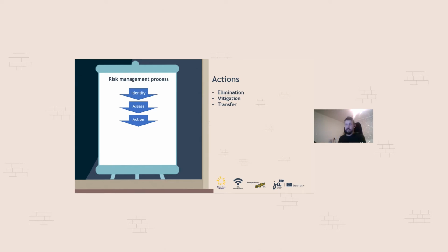So let's say the participants need to get to the youth exchange. And usually when it's not more than 5,000 kilometers or 2,000 kilometers, they are going by bus. I don't have my own buses, so I'm not going to take them by bus. And if something happens to the bus, that it gets broken, I have a huge problem. But if I hire a bus company, which will transport the participants to my project, then it's not my problem anymore that I need to do some technical checks, or if the bus gets broken, that I need to get a new bus. The company has its own buses, they have insurance, they have everything. If something gets broken or they don't have a driver, they will deal with the situation and not me. So I transfer the risk: okay, the risk can happen, but here you are, deal with that, it's not my problem anymore.